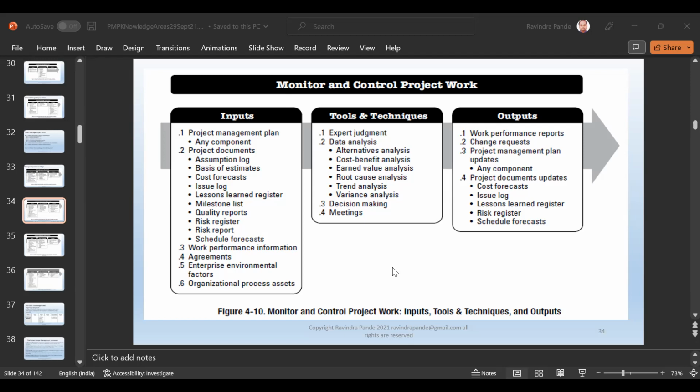In addition to that, we have a few documents which we normally start building at the start, or start reviewing on a week by week basis. That's a kind of thumb rule or a best practice. Many organizations might do bi-weekly as well, again depending upon the criticality of the project, complexity of the work involved, complexity of the engagement and all. We might consider reviewing bi-weekly, weekly, or bi-monthly, depending upon the policies adopted for the given project organization. Now project organization will also come to our discussions quite a few times. Project organization means the project team plus all who are helping these teams, meaning the associated SMEs, experts, reviewers, auditors, and the associated PMO for guiding that project team. And this is why we normally call it a project organization.